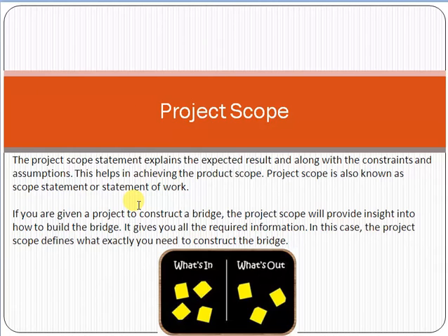So the purpose of scoping means that we are documenting the requirements of the customer so that we can make a boundary of a scope. Are you getting my point? Why is scoping important? Because we want to make a boundary. We want to lock down the requirements of the customer. For example, the customer says at the earlier stage, at the time of scoping, that he needs 10 requirements. So we make a scope document, get the scope document signed from the customer, and then start the development.